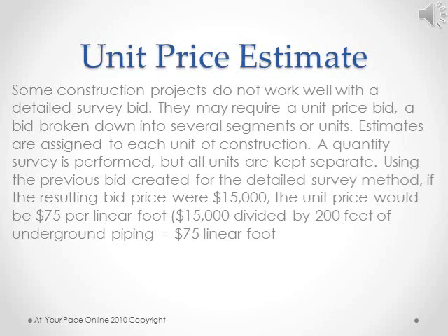Example: an excavation project requires the removal and hauling of an undetermined amount of fill material. Since the amount of work is not defined, the contractor quotes a certain amount per cubic yard on the bid form. This amount includes equipment rental and maintenance costs, labor costs, fixed overhead costs, and profit.